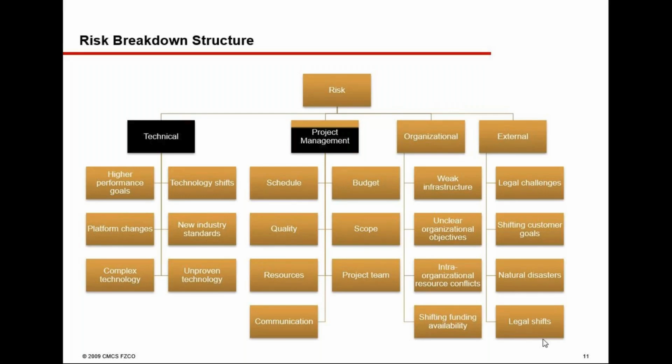Those categories are defined, and under that each and every category or classification is mentioned. Once you create a risk in the risk register, you assign this category to that risk, and that will help you in doing your risk management better.